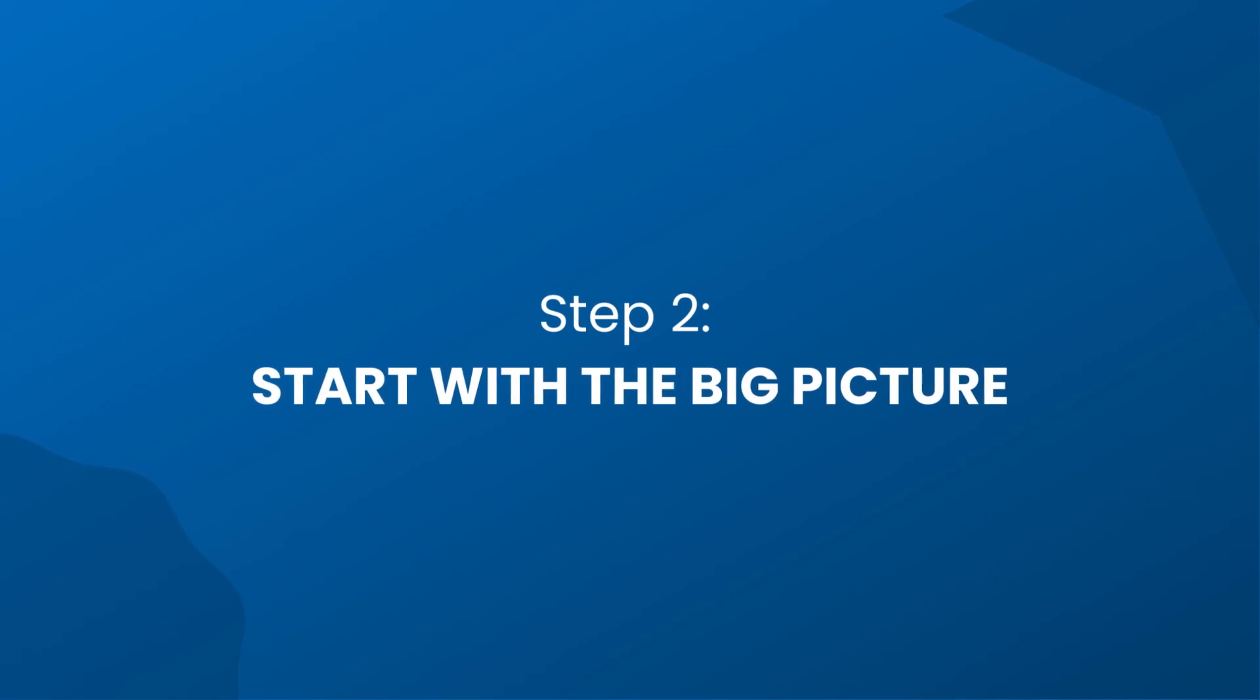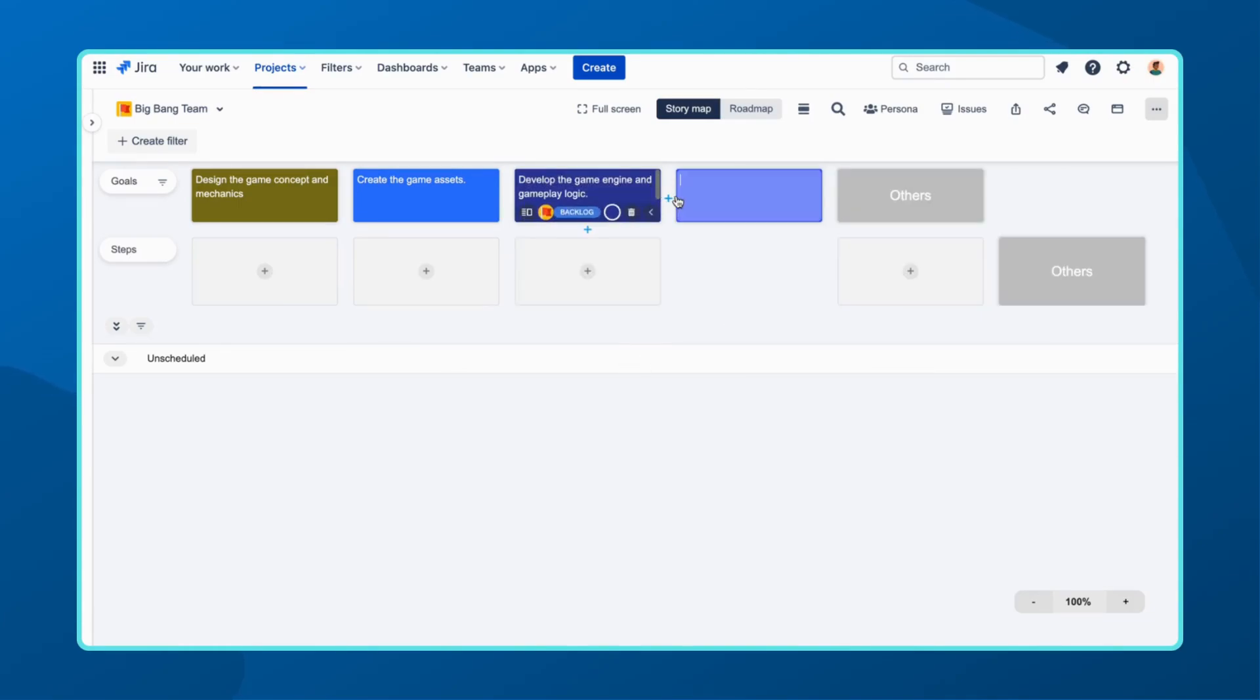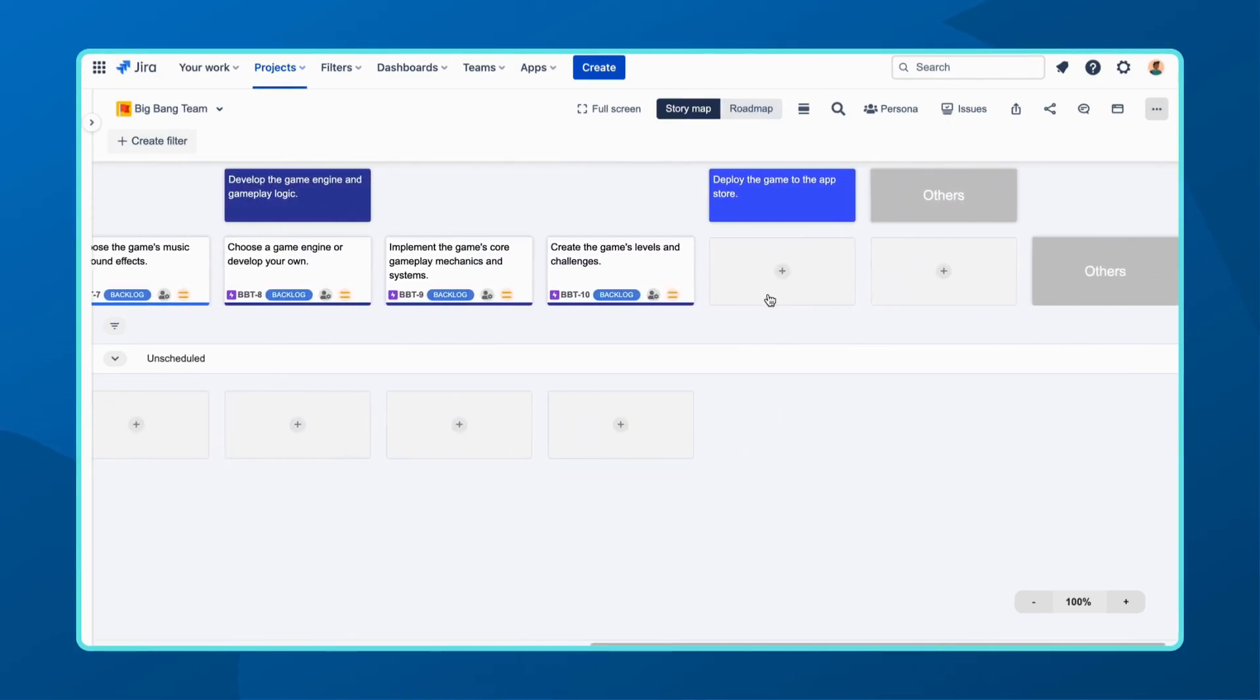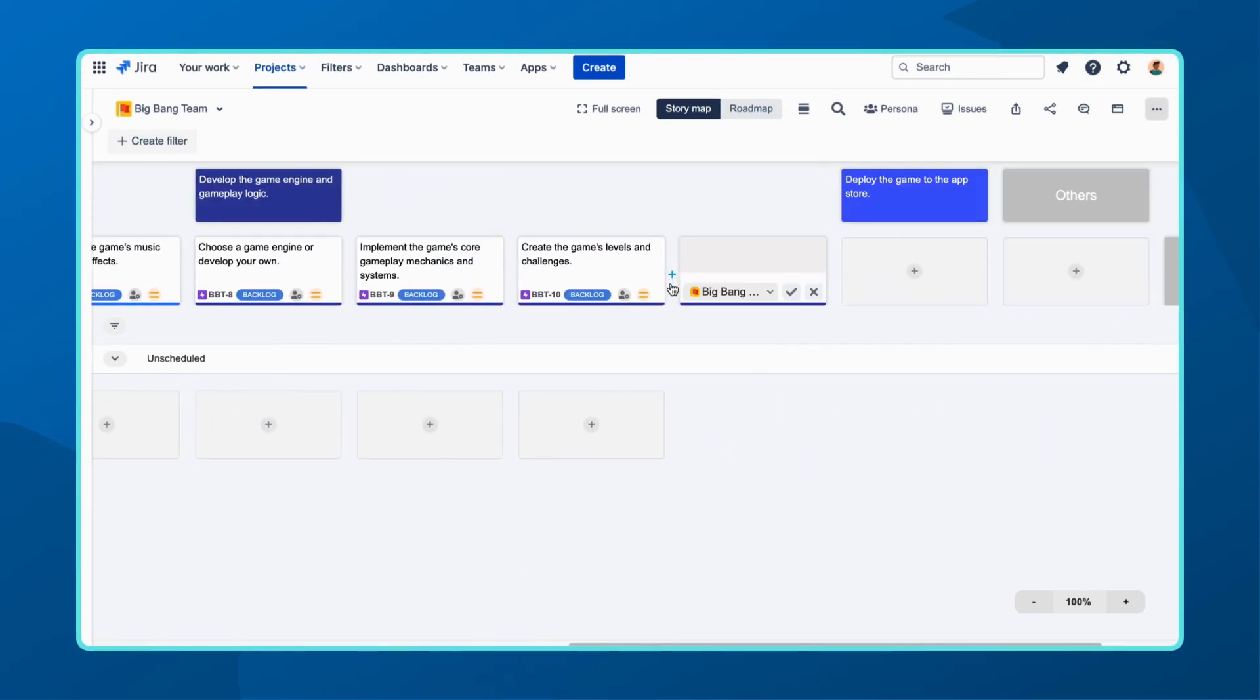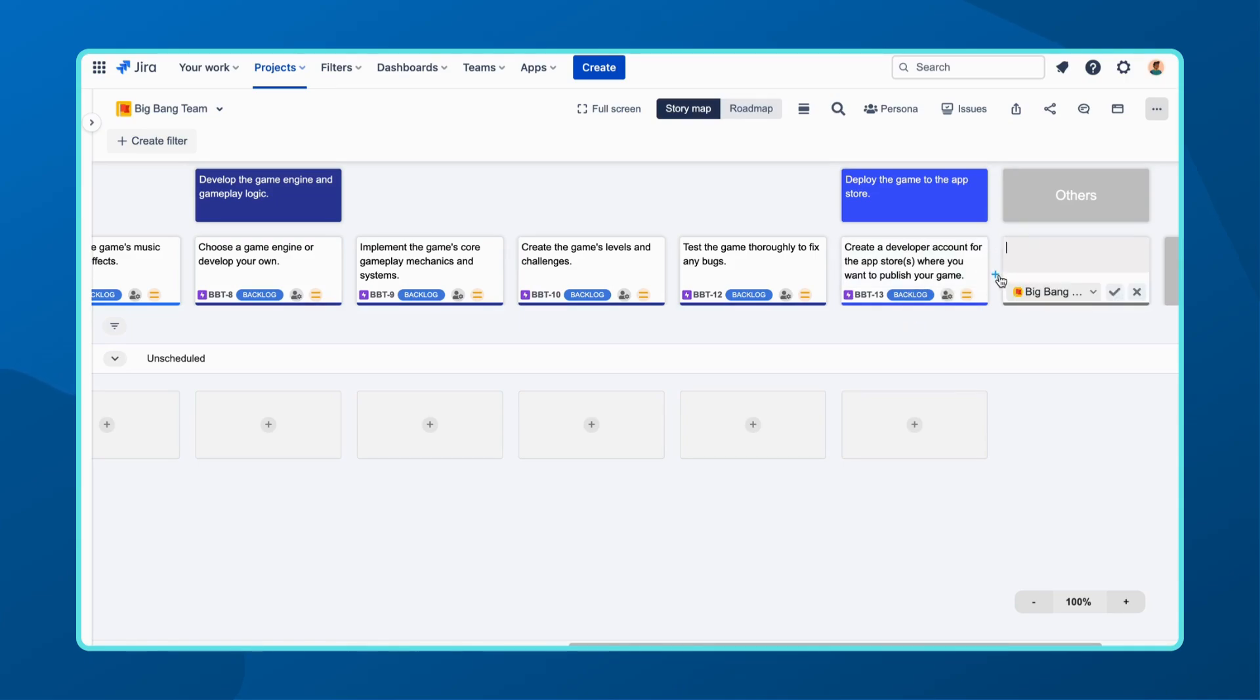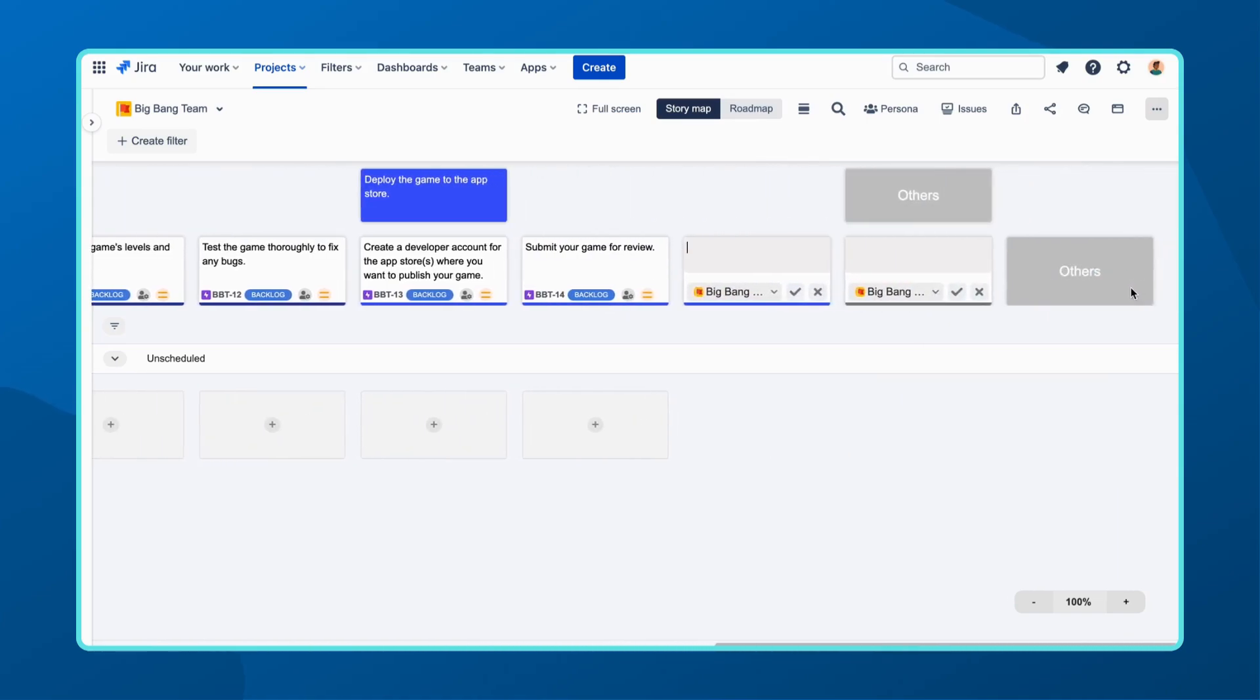Moving on to step two, now that you have your personas and their needs in mind, it's time to start with the big picture. Begin by defining your team's goals based on the personas and your project's purpose. Arrange these goals logically, creating a roadmap for your project. Under each goal, write down the steps or epics that represent sizable components of your product's functionality. Remember, these epics will likely need to be broken down into smaller pieces of work to make them manageable within sprints.